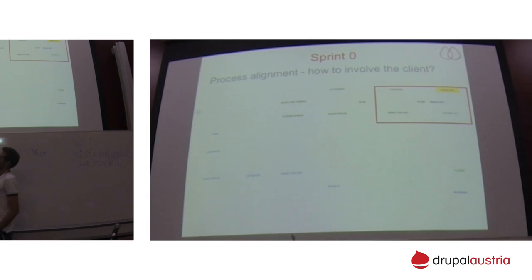Then it's marked as ready for acceptance criteria, and this is supposed to be done by the client. Then, once it's marked as ready for acceptance criteria, it goes to user story review. In this phase, the product owner is adding the acceptance criteria because the product owner owns the acceptance criteria. And here, the acceptance criteria should be an extension to the user story general description. In the case that I gave, it might be many different things, but it also might be something like: I expect that I have an interface, I go to a view where I can see different users, I define the user, I go to the specific user, and I assign by checkbox different roles, I click save, and the roles are granted to this specific user.